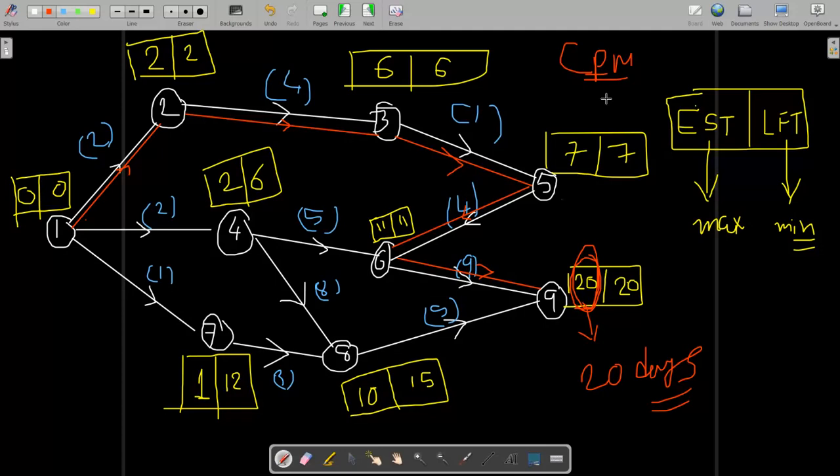Now here it is not a 6 day, that is my mistake. Sorry, yes, it is 6 day, because 11 minus 5, that is 6, but 15 minus 8, it is equal to 7. So whichever is minimum, 6 days. So this is the correct answer, 6 days.